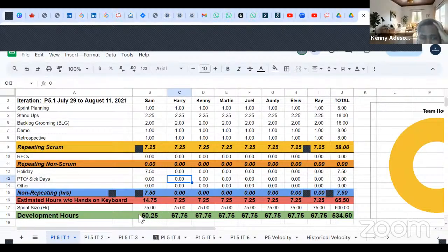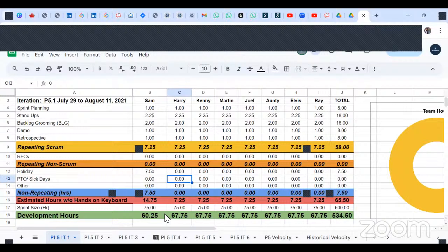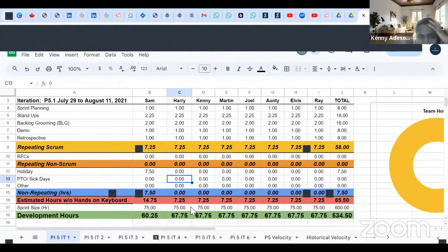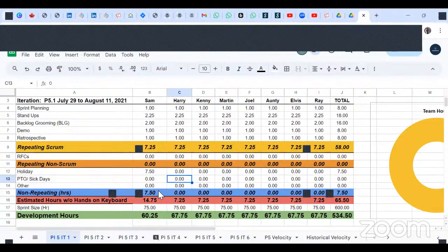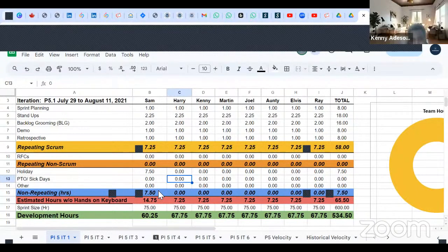Now, the good thing here, though, is this is to the detail of hours. And I told you that the unit of a task is hours. The unit of user stories is story points. So each story, let's say it is 8, and let's say we're committing to 20 story points as a team. The story points need to be broken down into tasks, and here's the reason. If you want to build a system, I want to give somebody access to get into the system so that they can access their accounts. There's a lot of tasks that go into that. Maybe you need to create an interface. It takes time.